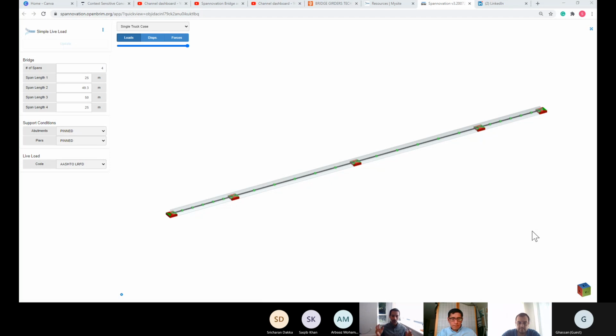I think that's really going to open up quite a few light bulbs when you start thinking about the site, where material can be brought in from, where they can position cranes, where they can lift from, and then it's going to start going into, do they need one crane or two cranes or a tandem lift, and those kinds of things. It's just good to go through that mental exercise, because it's going to make you learn a lot more about your structure, and how these Lego bits actually go together on site, right? And then you might start making some other decisions than what you're making.